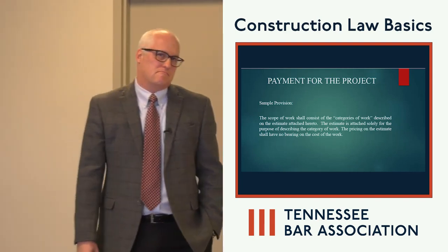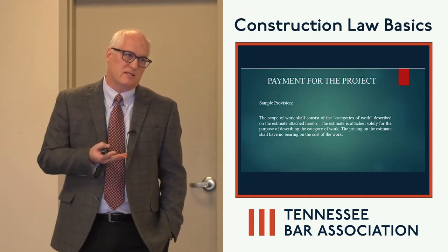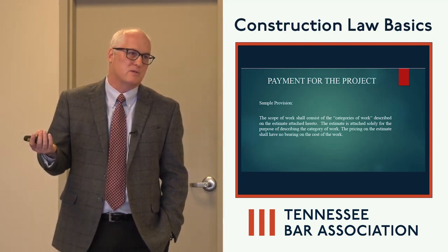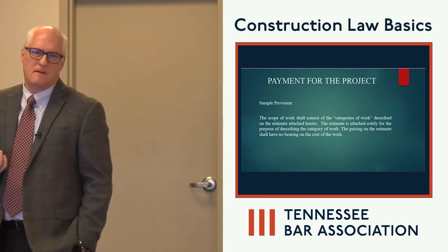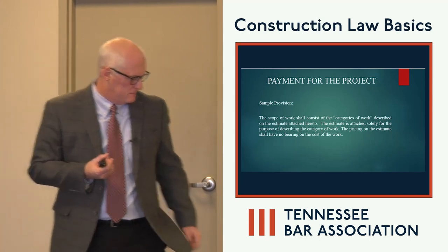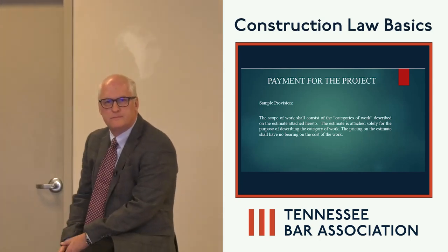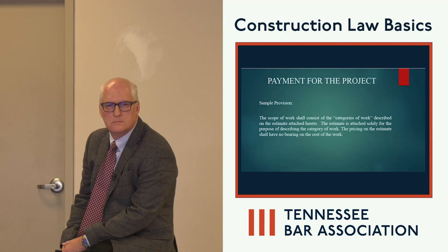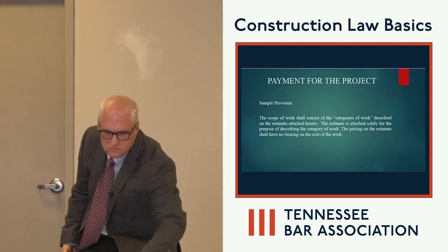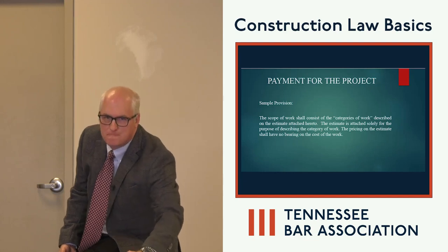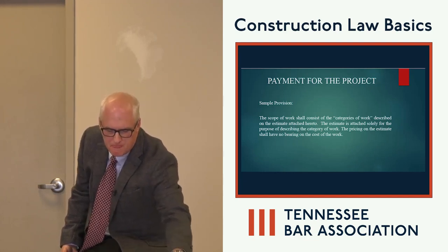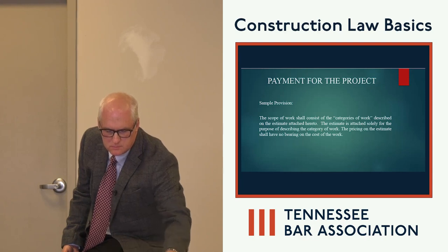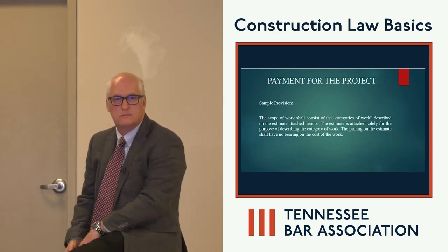Yeah, and I think most, at least the judges I practice for, probably would say the same thing. I just don't think that would be considered double dipping, in my opinion, as far as that goes. So, I think that goes into, and it's a problem because while there are certain items that most contractors and most construction organizations like ABC and AGC would agree are part of overhead, there's no real definition of that in the world. And so every contractor has their own version of what they capture as overhead, and frankly, a lot of that looks like stuff that might ought to be profit, and might ought to be something else.